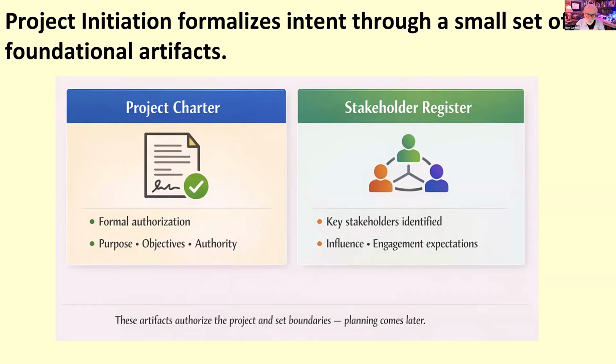And one of the things I'd always ask for is, where is your project initiation documented? A lot of times they've just moved right out of the selection into doing project work, and they never really sit down and define and get authorization and do all this stuff. So you wind up having to basically replan the project, go back through this initiating process, and then they have to make a decision: do we continue or not?